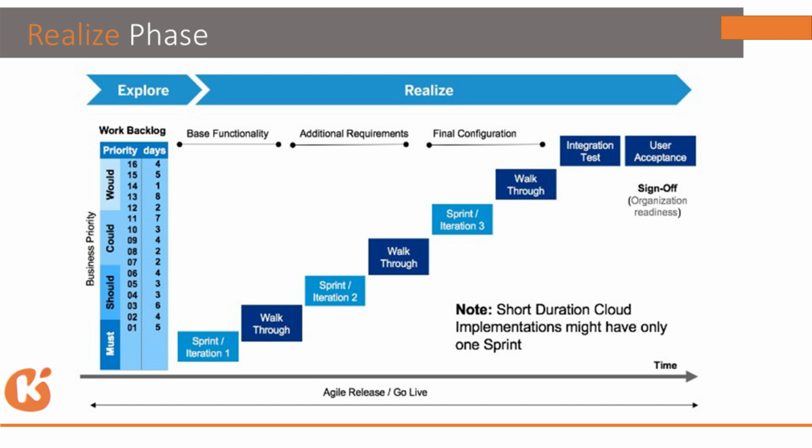So the sequence for ECP: first we define the company structure, the company code. Next, we define the personnel structure, and the pay structure, and we create the wage types. Then we go for actions. Finally, we go for option types. Then we go for any custom development and integration, and any rules that need to be written. So these are the steps.